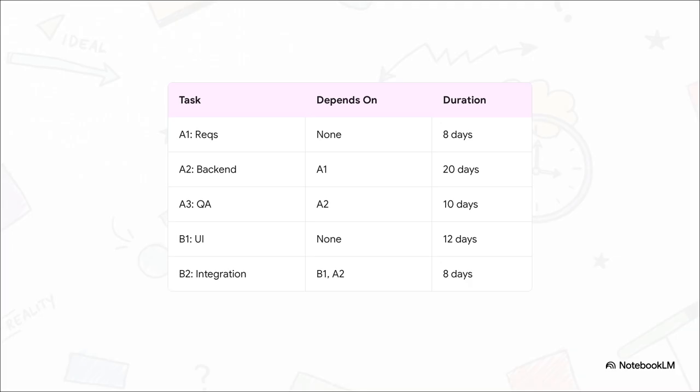And this kind of logical division really matters in real-world software development. Splitting into A and B branches is super typical when, say, front-end and back-end teams are working simultaneously to try and speed the whole thing up. Finally, there's integration. That's the grand finale, tying both of those branches together.